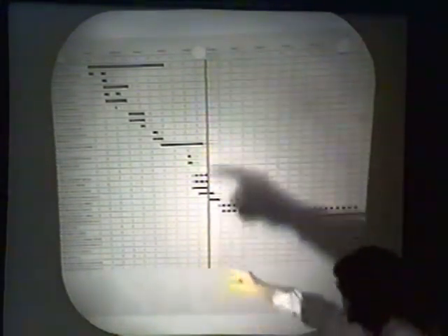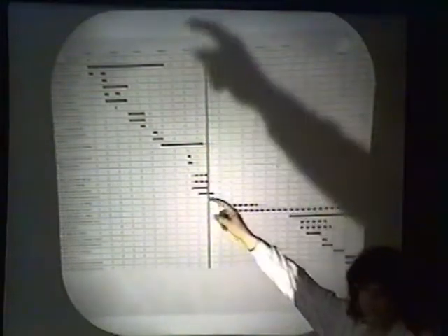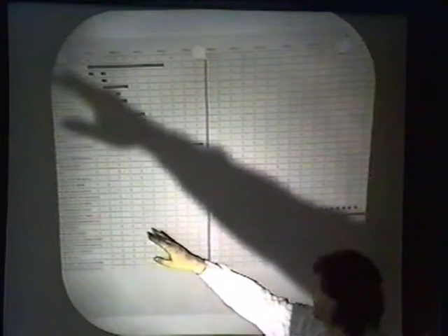The next page I have is 1410, a migration plan that I put together based upon what I've seen, being a little optimistic still, but with typical time frames of whatever's going on in a migration process. The center of the page is the installation point, where we open it up to more than one person and take it out of installation mode into pre-production mode. And the whole migration plan starts with CRE staff training.